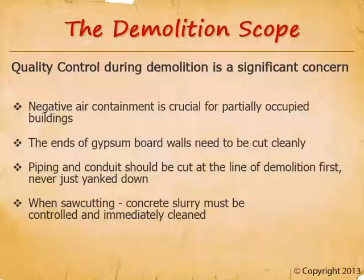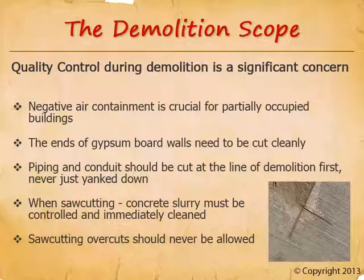When saw cutting or core drilling, the concrete slurry needs to be controlled and immediately cleaned up. Concrete cutting equipment is water-cooled — that water mixes with the concrete dust and creates a slurry that runs everywhere. If that slurry isn't cleaned up right away, it's going to dry and stain. Overcuts when saw cutting concrete should never be allowed. Due to the curvature of a saw blade, the saw can't cut all the way to the bottom corners of a square opening — those corners need to be chipped and ground smooth. That's a lot more work, so be sure the demo subs have it included in their bids.